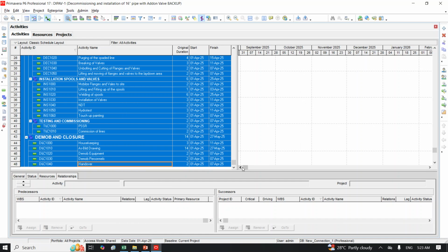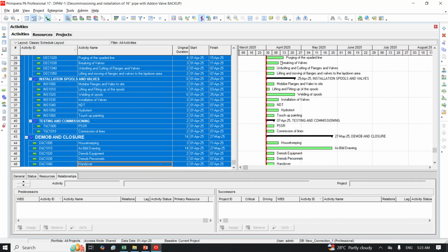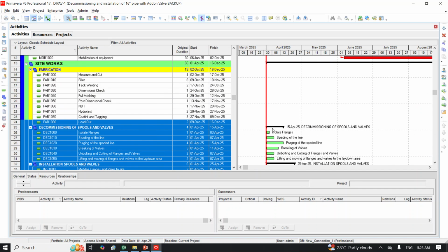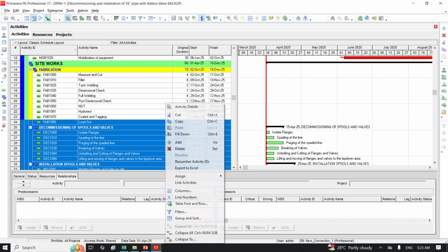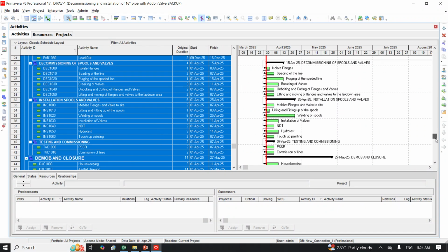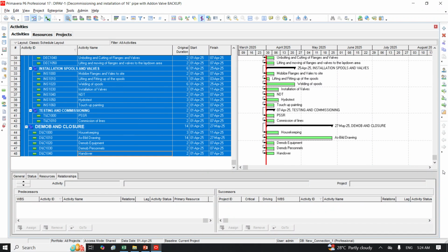Remember, before it was not linked. That's why you see all of them here. They are just lying on the start date. You see where the link is stopped. Okay, and that's where I selected. So I right click here and I select link activity. So if you watch now, lines have gone across them, which simply means that I've done them finish to start.